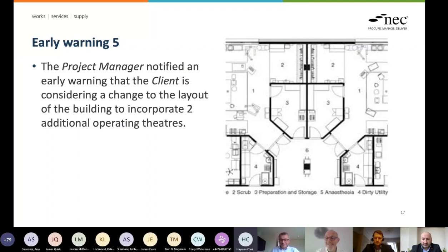I like the idea of instruction. Yeah. I can get my structural guy to get involved with the meeting, try to contribute. Okay, great. That'll be good. Brilliant. And absolutely, Paul, we need to make sure we get the paperwork in place, so I can do that with Matthew for the main contract, the ECC. And then obviously Matthew and yourself can get that organised around the ECS to make sure everything's in place and everybody is aware of what they're doing, and it's formally captured as the contract requires. Great. Thank you for that.